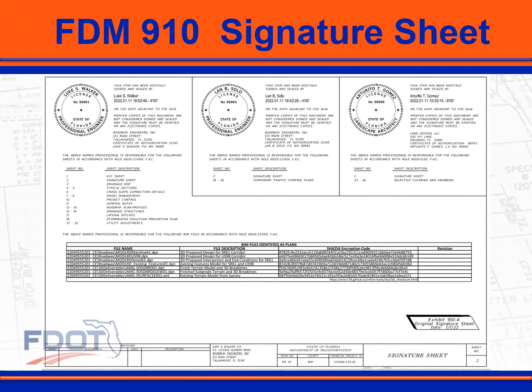A manifest for BIM files identified as plans has been added to the signature sheet. The manifest provides the file name and description along with an encryption code. The CAD manual provides instruction for new tools to support this process. A new process for post-let revisions made to BIM files is under development and will be released soon. With the delivery of BIM files for earthwork operations beginning with the July 2022 lettings, most projects will require a manifest.